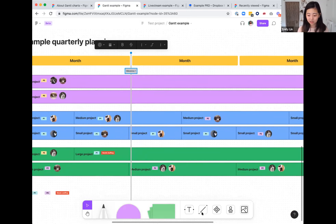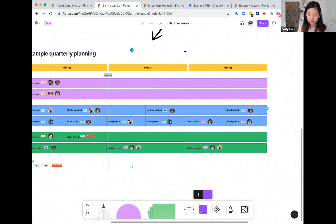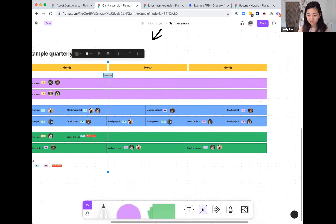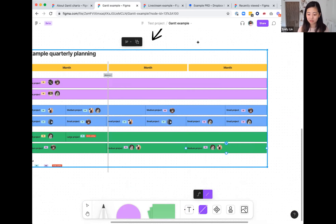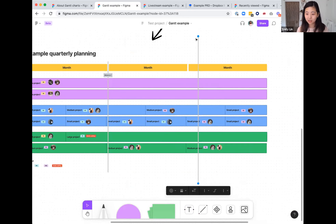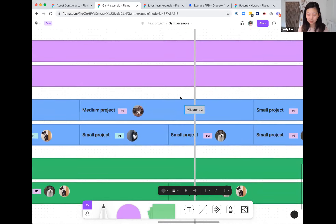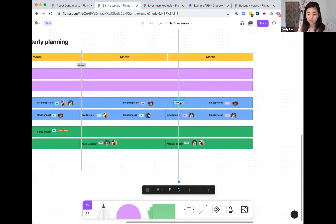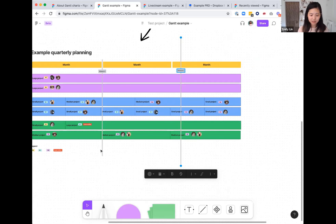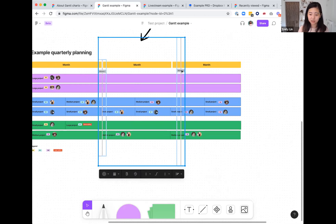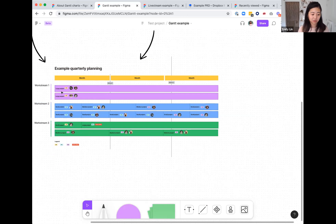To add a milestone line, click on the connector line tool and draw out a line. Double click on it or press Enter, and you can add text like 'Milestone Two.' Then click on that box and drag it to a place that's easy to read. One tip: sometimes the line overlays on top of your roadmap. You can right-click and send it to the back so it doesn't distract from your overall roadmap.